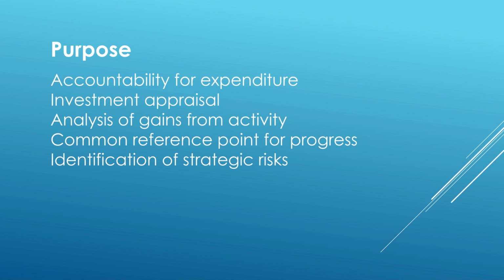So what is the purpose of a business case? Now remember, this is according to APM in the context of a project, because a business case is a standard business tool. The purpose of the business case in project management is to ensure that we're having accountability for the expenditure of our funds. So part of that is to do an investment appraisal. That is, how much money are we spending and what are we getting for it? So basically, is it value for money?